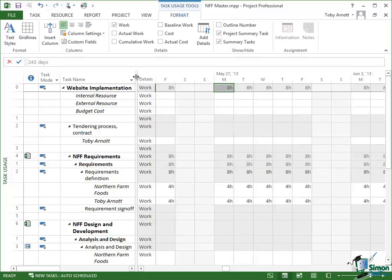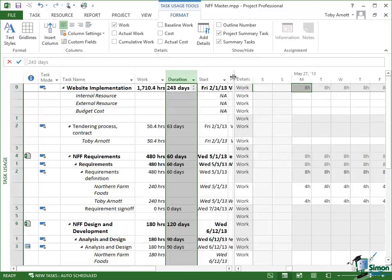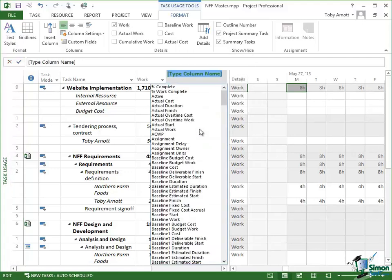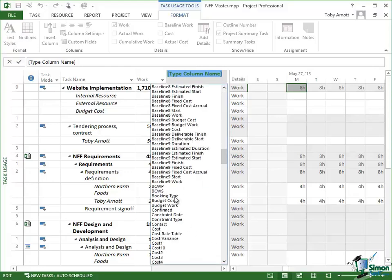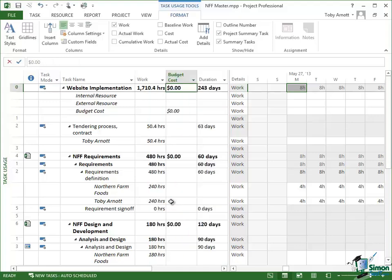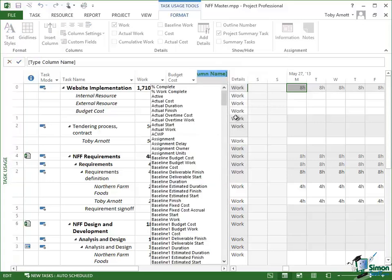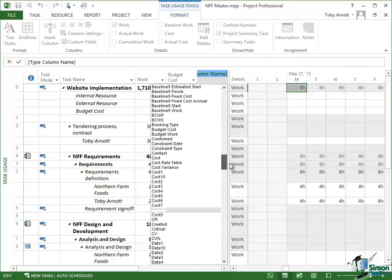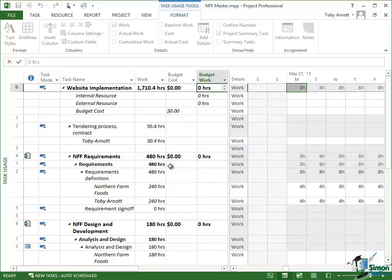Now I'm just going to move this dividing line over here because what I need to do now is to show two fields that aren't normally shown. So in here I'm going to Insert Column. The column I'm going to insert is Budget Cost, which is there, and then here I'm going to insert another column which is Budget Work. And these are the columns that I use to enter the figures that I've already estimated.